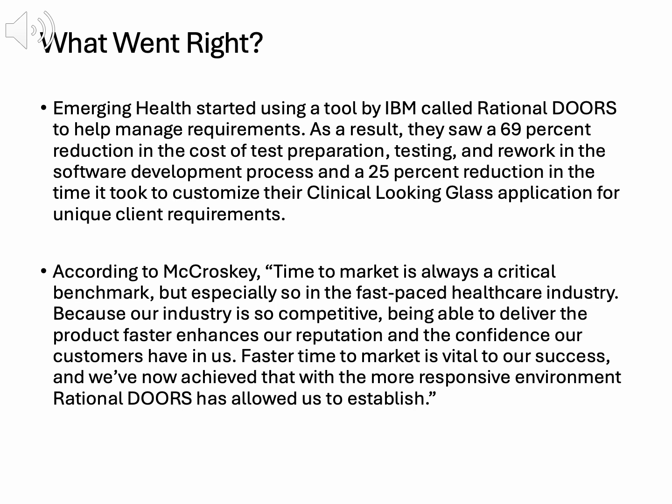This slide showcases how Emerging Health used IBM's Rational DOORS to streamline requirements, illustrating the power of structured processes and scope management. Emerging Health, a healthcare company, adopted Rational DOORS to manage project requirements effectively. The results were transformative: a 69% reduction in test preparation, testing, and rework costs in their software development process, and a 25% reduction in time to customize their Clinical Looking Glass application for clients. These gains came from clear, traceable requirements, ensuring deliverables met needs without rework.